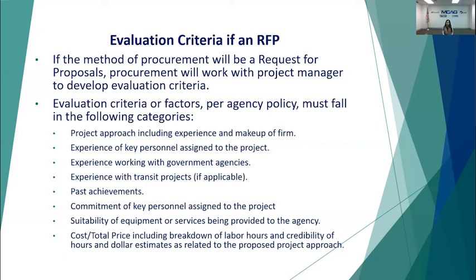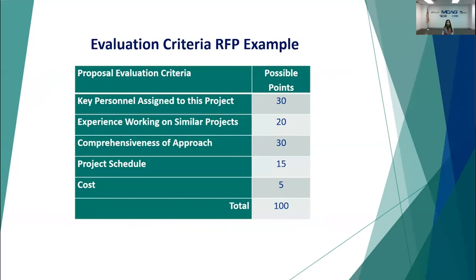Not the determining factor in an RFP, but can be a factor and usually is the cost or the total price, including the breakdown of any labor and hours and the credibility of the hours and dollars estimates as related to the proposed approach.